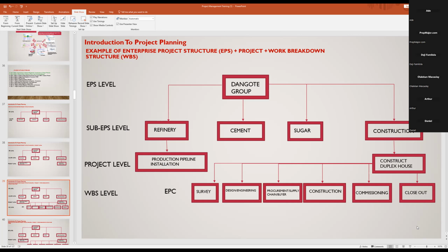Because your role as a planner is to deliver the project to cost and time. To cost indirectly, but to time directly. In the sense that to cost, you are supporting the commercial manager by telling him what is going on in the project.